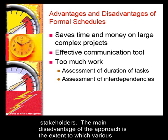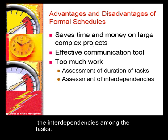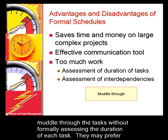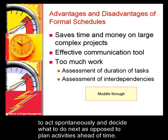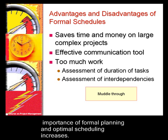The main disadvantage of the approach is the extent to which the various details have to be looked after. CPM requires assessment of the duration of each task and interdependencies among tasks. Some project managers, especially those dealing with small-scale projects, prefer to move through tasks without formally assessing duration. They may prefer to act spontaneously and decide what to do next rather than plan activities ahead of time. But as projects get more complex, the number of people involved increases, and the importance of formal planning and optimal scheduling increases as well.